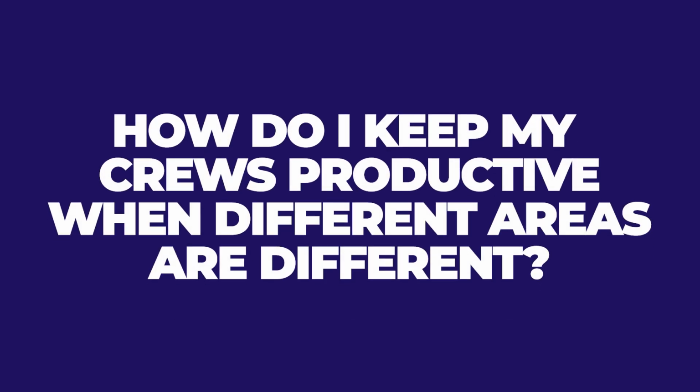The answer is yes. How do I keep my crews productive when different areas are different? Here's why it hasn't worked in the past, because everybody's like 10,000 square feet, 10,000 square feet, 10,000 square feet. Well, you go to this zone, it's different, it takes longer. Go to that zone, it takes less time. Go to that zone, it's impossible. You don't create zones based on area. You should never have equal, equal, equal unless accidentally you do on like a multifamily project.